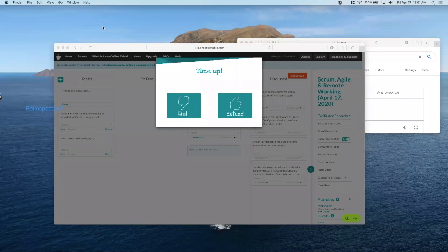Yeah, I think revisiting the definition of done is perhaps important because they are meeting their current definition of done, which is it's tested in the first environment. But there are also some things that you can't test in one environment. It can only be done in a higher environment. So then you can never get that one actually tested because the sprint ends and you're not in that higher environment.